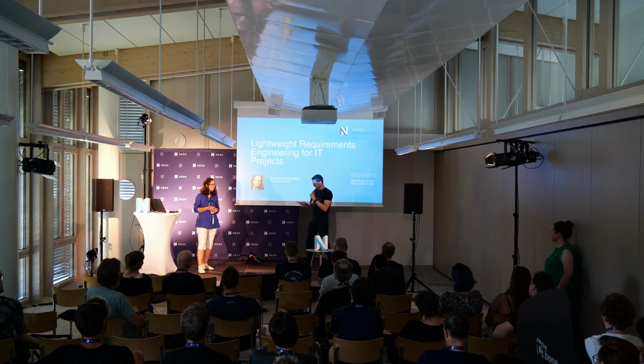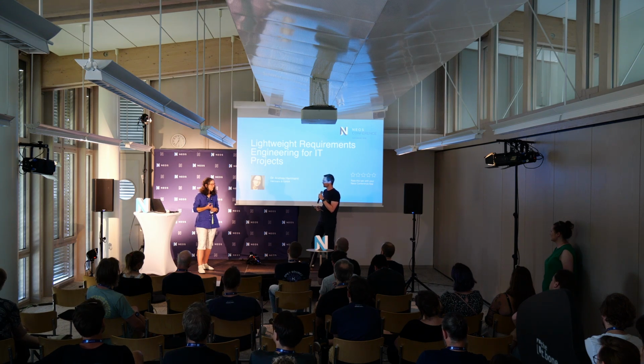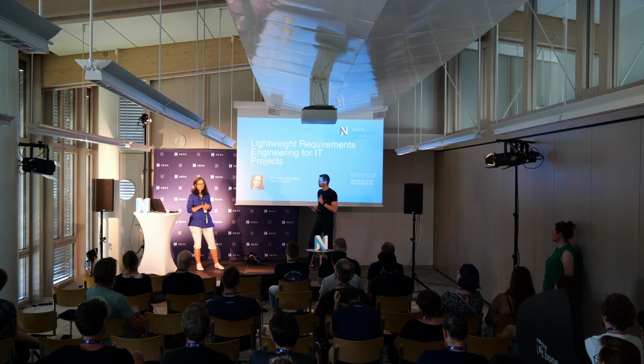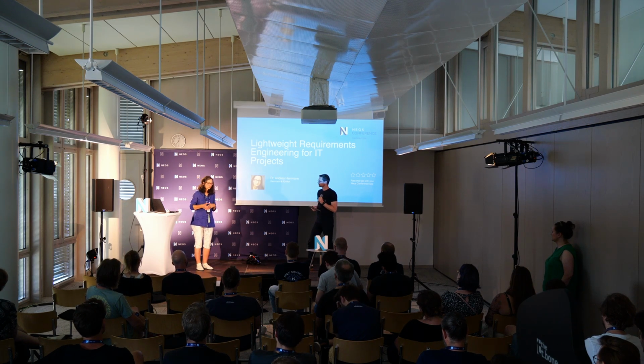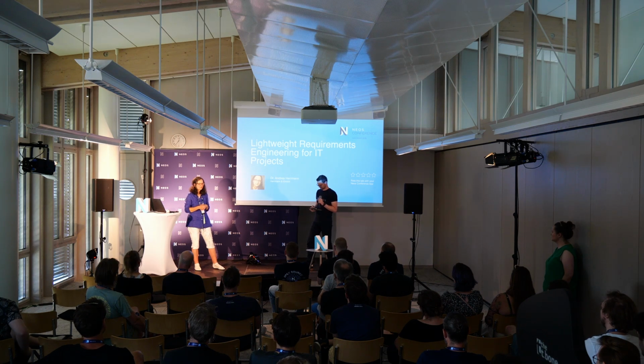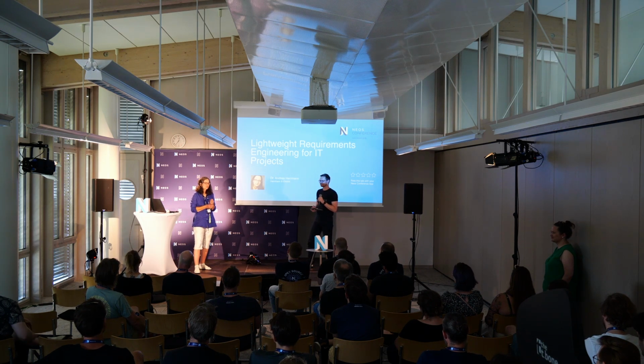Based on your experience, how well does estimation work based on the requirements you create? Effort estimation. For us, it was quite simple because we usually had a standard software, so we know from experience that one feature is 10,000 euro or something, or 10 days work or so. That was quite good. The problem was rather sales, because we said it costs so-and-so, and sales said it's too expensive. But the estimation itself was quite simple, because experienced programmers, they know exactly what it will take.